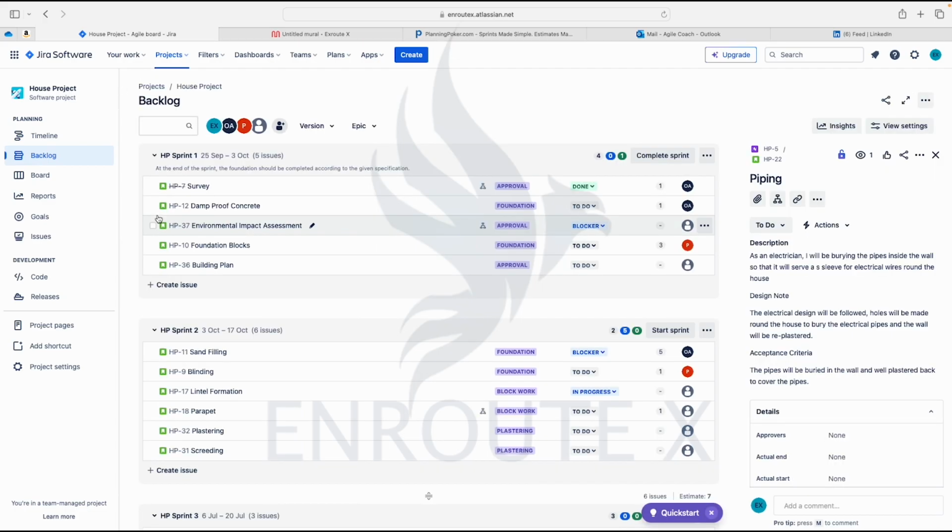So the first thing that happens in the sprint review is that the team takes the stakeholders through the board, what they were to commit to, what they were able to complete, what is left for them to complete if there is any, and then shed some light on when that would be delivered.